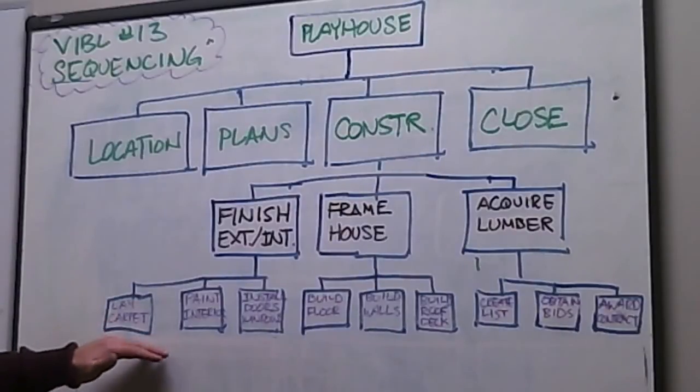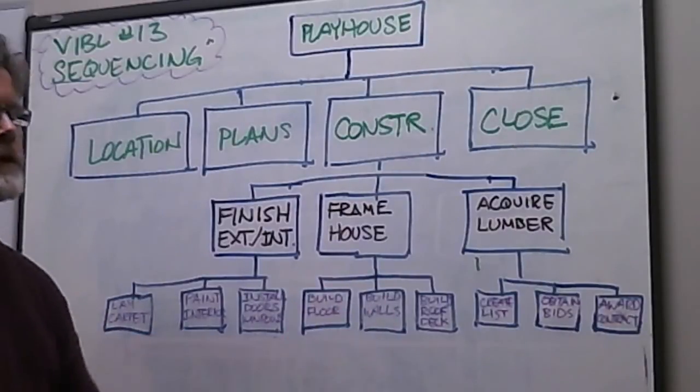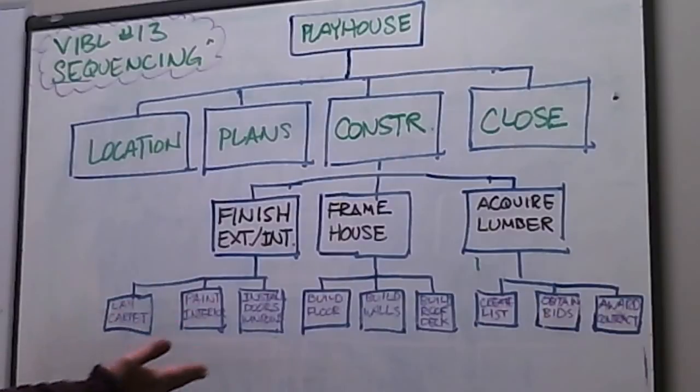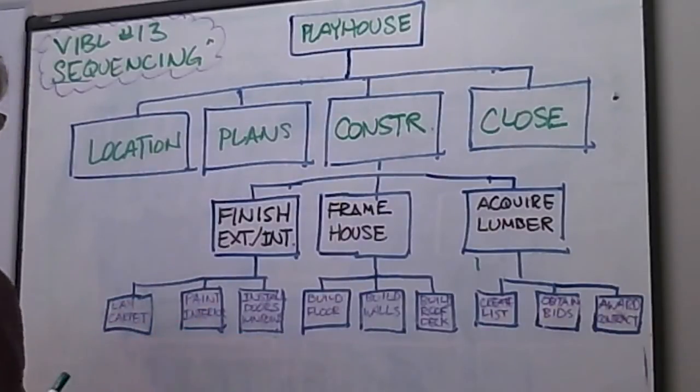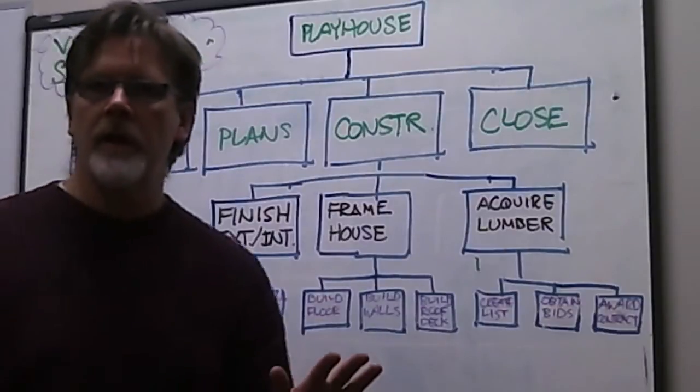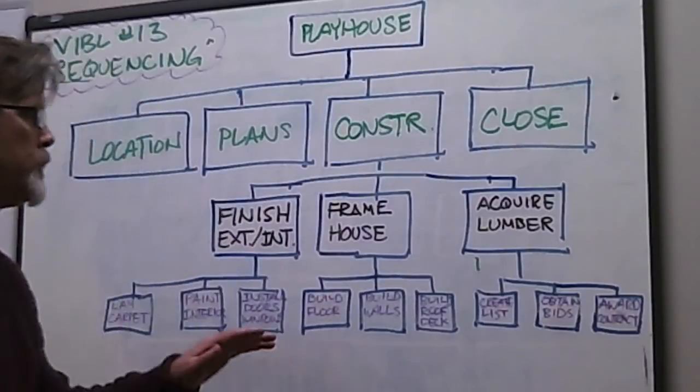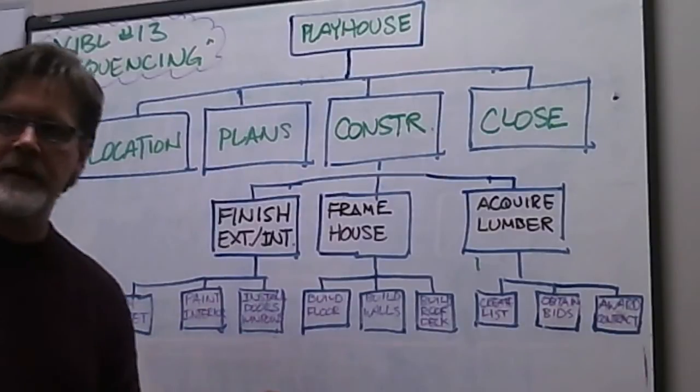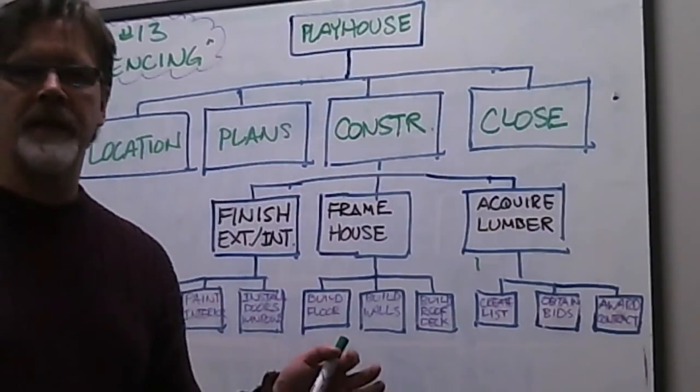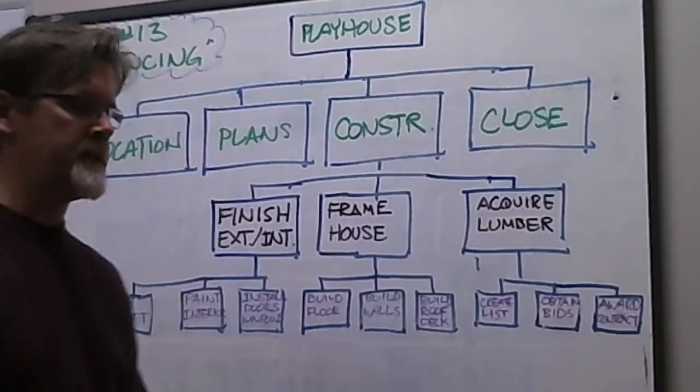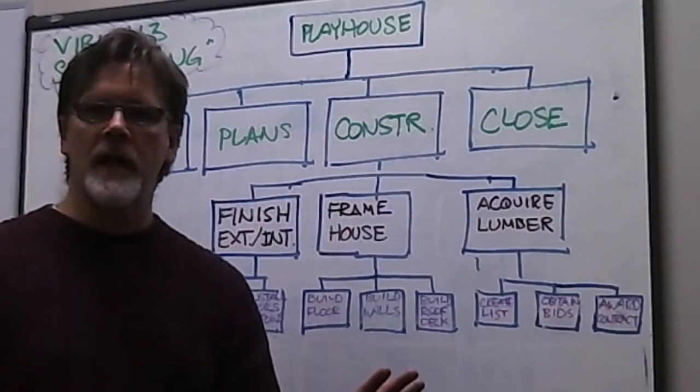In fact, if you look at each of the activities that support these work packages, that's precisely what is shown here in the work breakdown structure. Again, as I mentioned earlier, recognizing the fact that if you choose the third tier, which is your activity tier, where you've got the activities that support those work packages, we must be consistent on the logic.